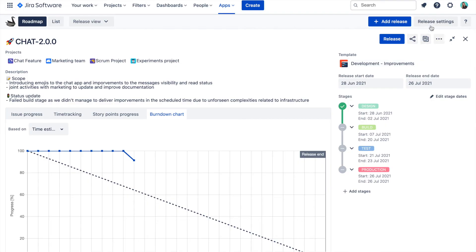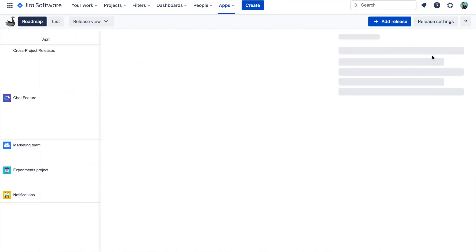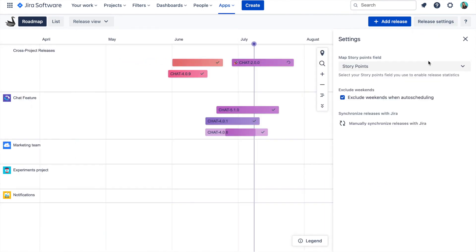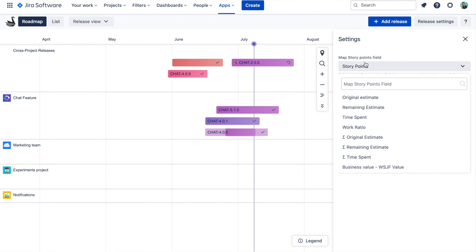You can choose your burndown chart to be rendered based on the issue count, story points or time estimate. Just a quick note: to set up story points tracking, you just need to select your story points field in the settings over here. Afterward, all reports are generated automatically based on this field and you don't need to limit yourself only to story points. You can select any numeric custom field that you have in Jira.